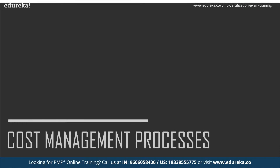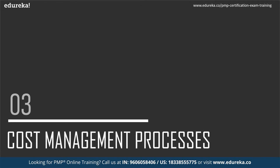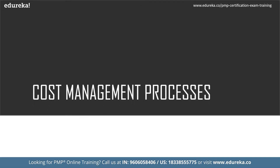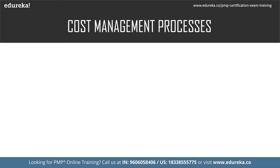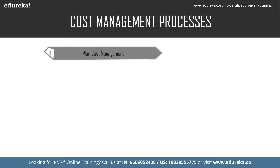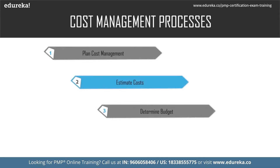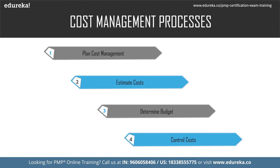Let us look at the cost management processes. Cost management includes four processes: plan cost management, estimate cost, determine budget, and control cost. Plan cost management, estimate cost, and determine budget are part of the planning process group, whereas control cost falls under the monitoring and controlling process group.